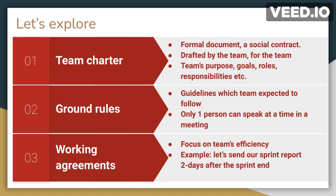Another example is about setting certain expectations. If the team is working in a scrum environment, at the end of the sprint the team may send the sprint report two days after the sprint ends. This clearly outlines expectations to all stakeholders that only after two days when the sprint ends will the sprint report be generated. This sets the right expectations with stakeholders and helps the team become more productive.